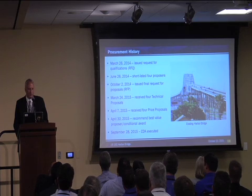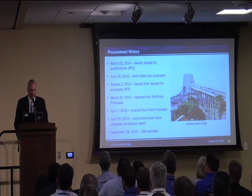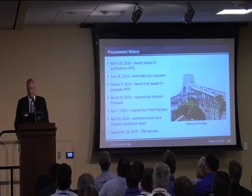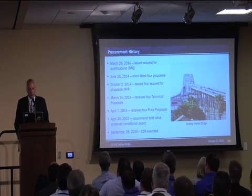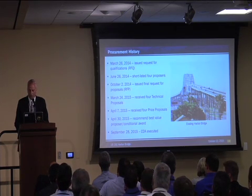First we got the technical proposals on March 24th of 2015, and then about 2 weeks later the price proposals were submitted. On April 30th, 2015, we recommended the best value proposer and got a conditional award. And then 2 weeks ago, we finally executed the contract on September 28th.